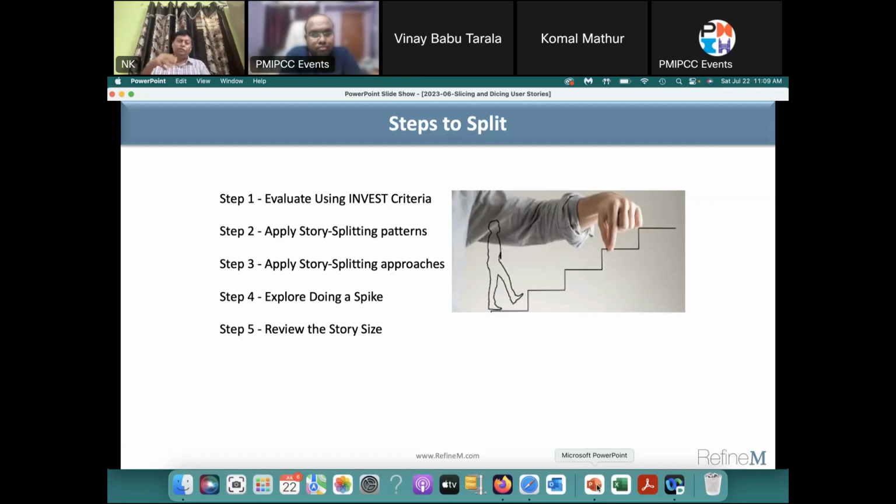Maybe split that into a story of 5 story points and 3 story points. The advantage is then they can be developed independently. So that's the advantage you get. So even if it is doable, see if there is a possibility to split it, because smaller the better. You have more control on that. You can actually get more flexibility. You can prioritize those independent pieces, right?